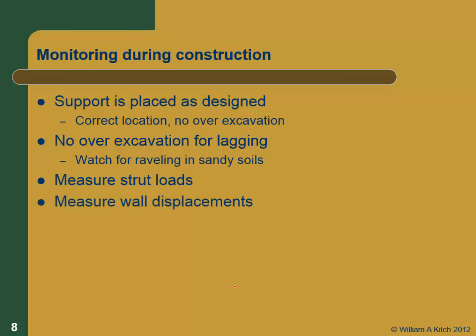And you should measure the wall displacements. There's several ways to measure the wall displacements. You can actually just put a slope inclinometer in the flange of a number of the struts, and you can run the slope inclinometer up and down. You should have more than one way to do this, by the way. You can put survey monuments on and do surveying.